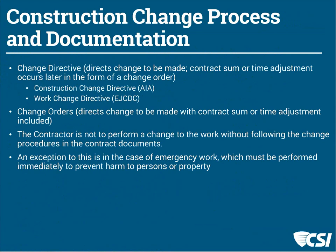In North Carolina, the contractor is not to perform a change of work without following the change procedures in the contract documents. There are exceptions if there's an emergency — personal harm or property harm that is foreseen or might be inevitable. Our formal documents say the contractor can't make a change without a written directive or agreed-upon change order. But it happens without that being done all the time. It's not supposed to, but it happens — even with state agencies who produced the documents saying you can't do that.